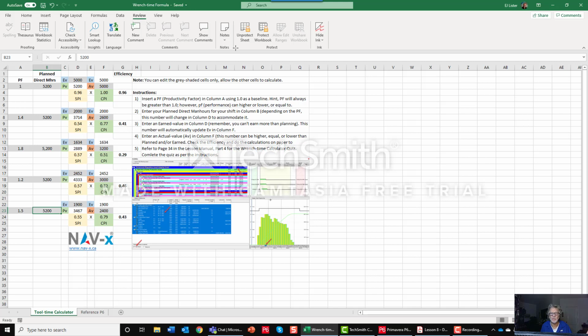So if I'm working in Argentina versus Canada versus Saudi Arabia, if I have different levels of competencies within my organization, depending on the height or the location of a particular asset. So I have the same planned hours for a strip down rebuild procedure on a tube exchanger, for example, and I estimate those as benchmark standard norms, so only tool time. I don't take into account travel time, lunch time, break time, non-productive time.